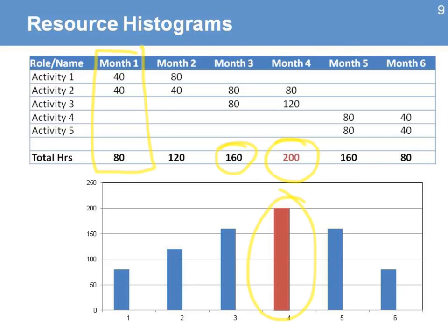The estimates could have been wrong, but most of the time maybe you do need to spend that time. Maybe that activity doesn't need to take 2 months, maybe it takes 2.5 months, and you need to spread that time into the next month. The idea behind all of this is that if you assign somebody to do more work, they're not going to be able to do it, and the quality is going to suffer, the project is going to get delayed, and motivation is going to be down. Make sure that situations like this don't happen.